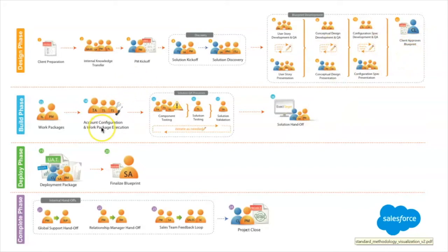So these could be like business unit setups, sender profiles, or activating different studios or journey builders or different aspects of the platform. And once these have been configured, they go through the quality assurance process. And after that, it is handed back to the project lead team. You can say that the build phase has finished, and then it is ready for deployment.